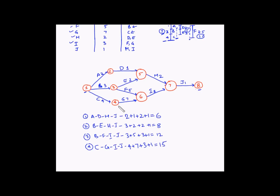We have now determined all possible paths from node 1 to node 8. Comparing total durations: 6, 8, 12, and 15 days. Since 15 is the longest, path C-G-I-J is the critical path. We denote this path with double arrows, and this is the path the project manager should keep a close eye on to ensure the project doesn't get delayed.